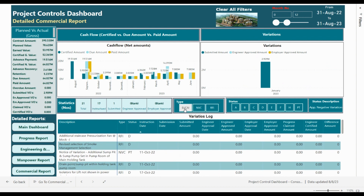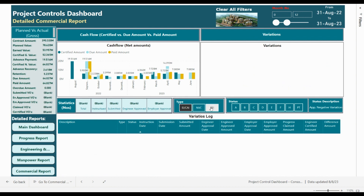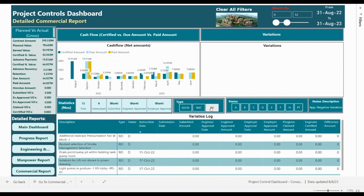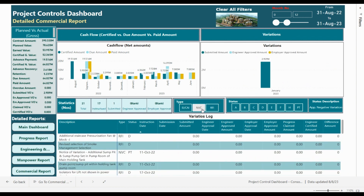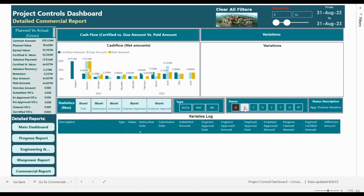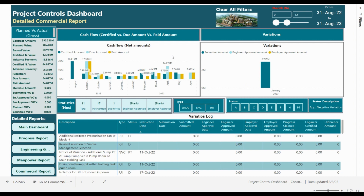You can filter the variation log by type — EI, VC, RFI, direct notification, or engineer instruction. You can also filter based on the status of the variation: for example, approved positive variation, approved negative variation. We currently have nothing approved. You can filter based on status, based on type, and you can also increase the analysis period from here. This covers all the details about the report.